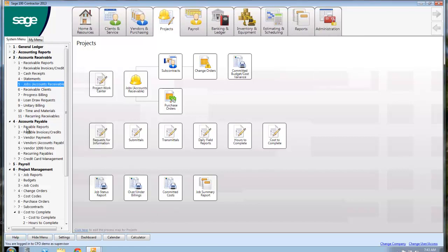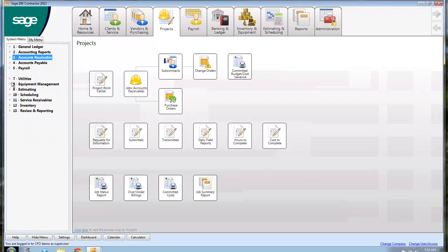Yeah, our job cost is different than QuickBooks. QuickBooks only has the labor. Ours has all of the burden, so workers' comp, health insurance, 401k, whatever you have, all of the taxes that are payable, your Social Security and your Medicare. And so let me close a few of these up. It's getting a little busy here.